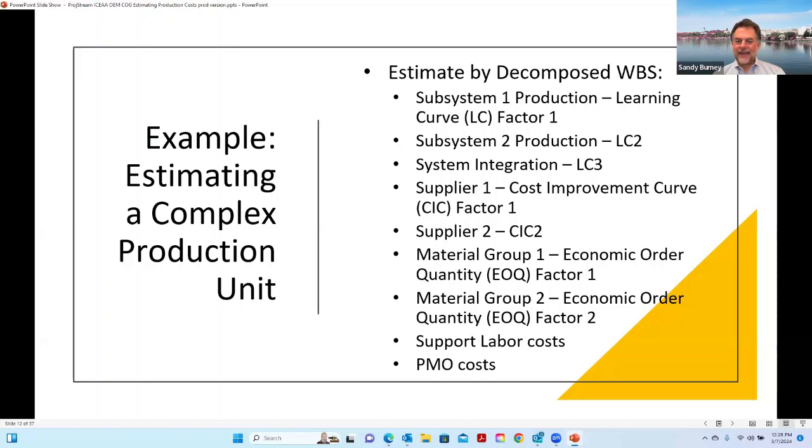Well, if they don't have the lower level, you have to work with what you got. So you probably want to look at the higher level and apply some of the learning curve theory to the data and see if you're getting a learning curve. Does it make sense? Cost estimation is more art than practice, because you have to look at what your results are and see, does it make sense?